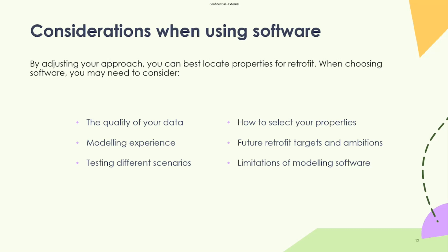So if you're looking to put forward, let's say, a project of 100 homes, carrying out either 10% of retrofit assessments for those homes to understand how it's performing, or even better, doing it on an archetype basis. So actually understanding what archetypes fit within those 100 homes and how many retrofit assessments you can do per archetype.